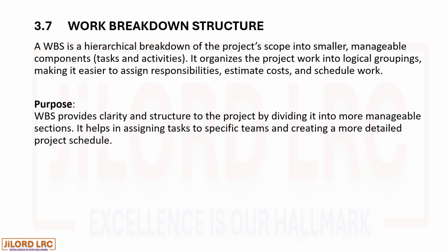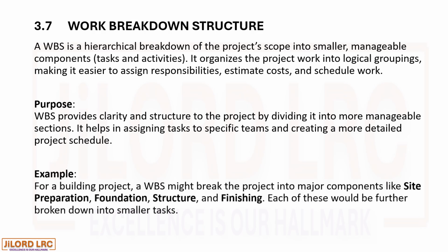Purpose. WBS provides clarity and structure to the project by dividing it into more manageable sections. It helps in assigning tasks to specific teams and creating a more detailed project schedule. For example, for a building project, a WBS might break the project into major components like site preparation, foundation, structure, and finishing. Each of these will be further broken down into smaller tasks.